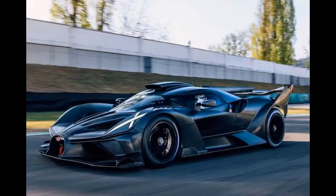Selecting phase, Request for Proposal, RFP. LJRC decides to explore external engine builders to achieve a guaranteed 20% horsepower increase. They issue an RFP to 3 reputable engine builders with a proven track record in drag racing applications similar to LJRC's car. The RFP details, Overview. Project objective is to increase engine horsepower by 20%, target output of 5,400 horsepower.